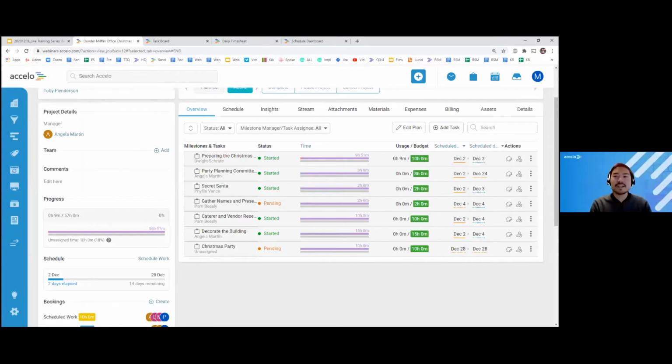Yes, that's a great question, Alec. And again, since auto schedule time is the system automatically trying to be helpful, there are several ways that you can also remove it from a task. First, the task is active but has no remaining time. Maybe you've already used all that time or allocated it somewhere else. All the time that has been estimated has already been used. Accelo therefore doesn't have any more time left to auto schedule, and we will not see any more purple time for that task.